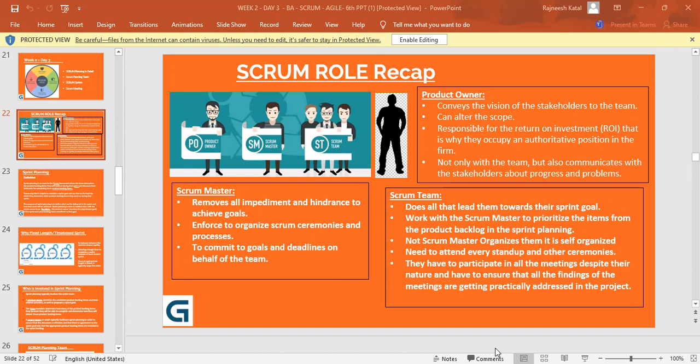If tomorrow we want to work on something and deliver something, you as product owner and Scrum Master will have to come and discuss with us, right? Because you are not the only person working on that. The Scrum Master is involved on a daily basis, but that doesn't mean he works on all the requirements or knows everything. We have subject matter experts, testers, and business analysts. So the entire team sits together in a meeting before sprint planning, understands, and then confirms the requirement.